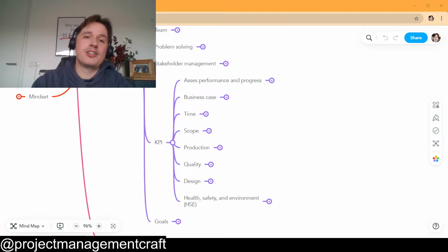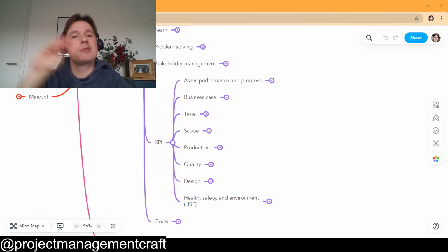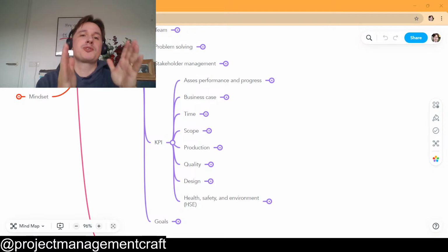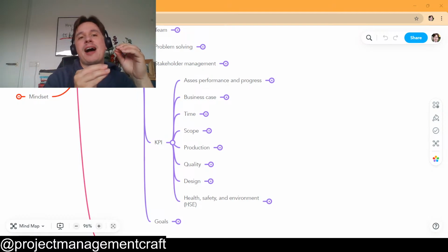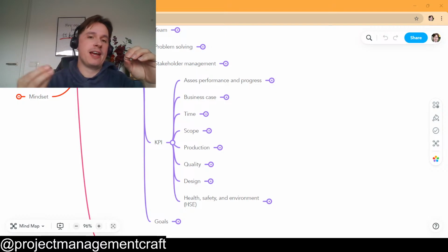The same as in the engineering part, the goal is completely misaligned with the project, because in some projects it was required to buy stuff in 1 month, and if you do it in 3 months, then you delay the project. So the alignment of the KPIs among the different areas needs to be there.